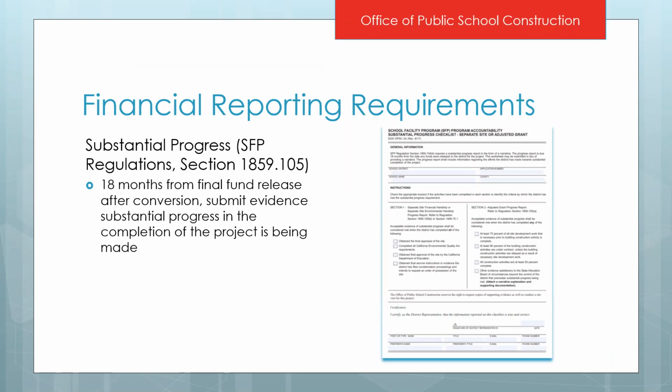The other thing that you're going to be required to do after your final fund release is demonstrate that you are making substantial progress on the completion of your project. You will submit this form, which is also located on our website, 18 months after you receive your final fund release. One thing I want to point out about this form is when you look at it, you will notice